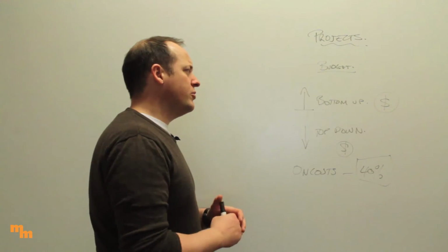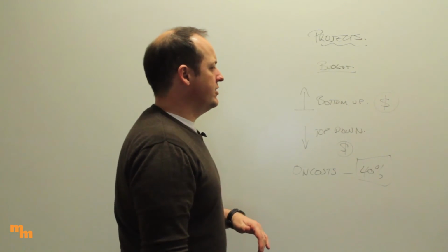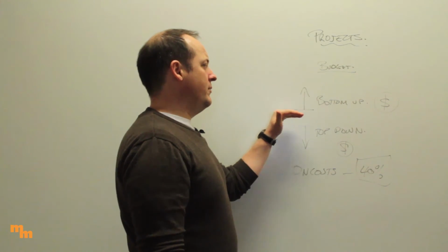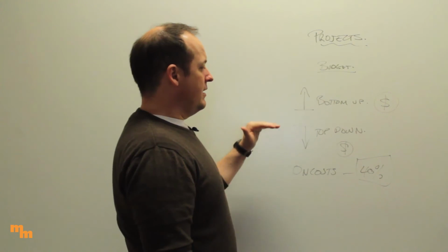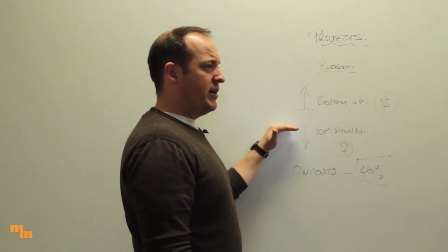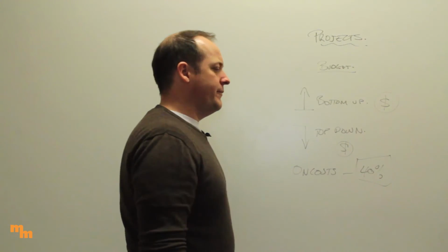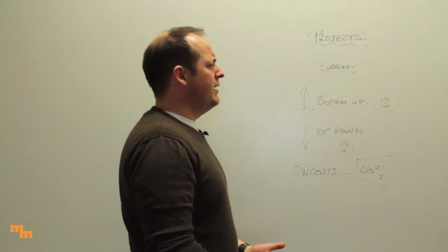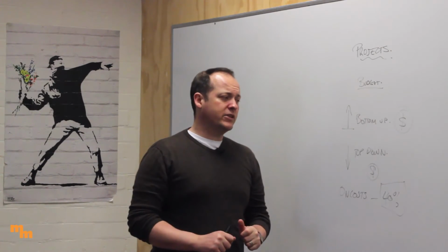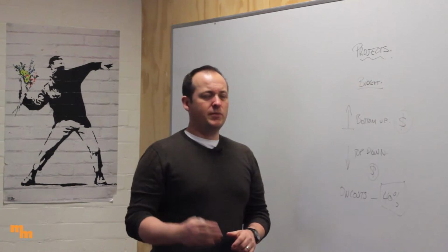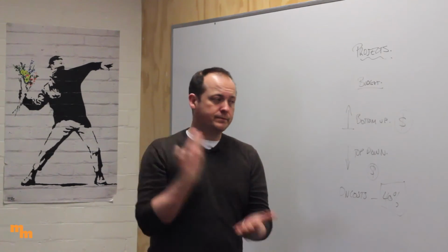All that labor cost, all those things, it all goes into the budget here, so we know exactly how much we're ready to spend. And once again, if we just work out what we need to do, add that all up, that's a bottom up. The alternative is we get told how much money we have to play with, and then we have to make everything fit within that budget, which is top down. All right, so think about your on cost, think about all that. It's all that hidden stuff. That's what really tends to bite people. People are really good at identifying the obvious stuff, but those little details, maybe not so much. All right, cool. So we'll talk about ways to get around that as well.